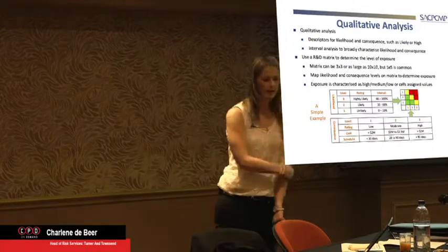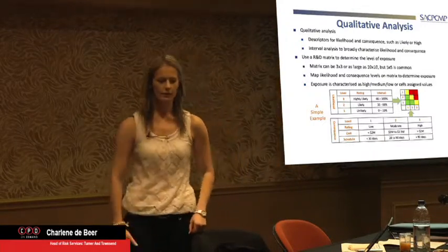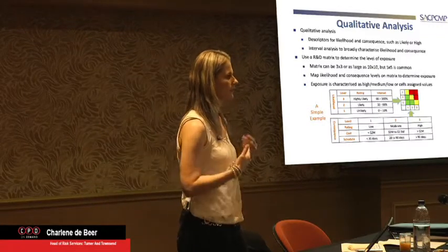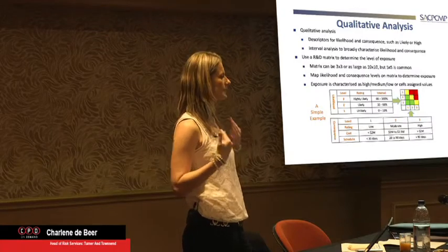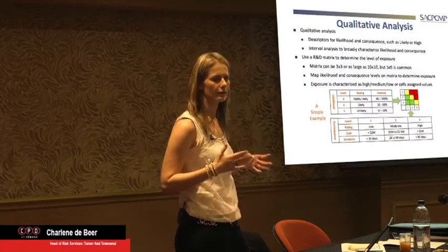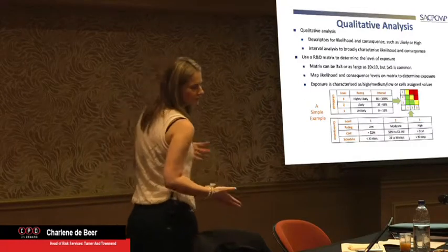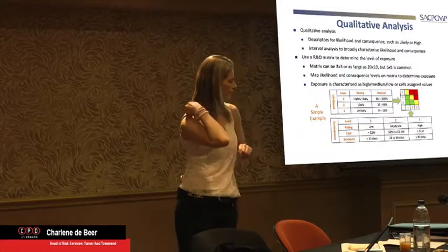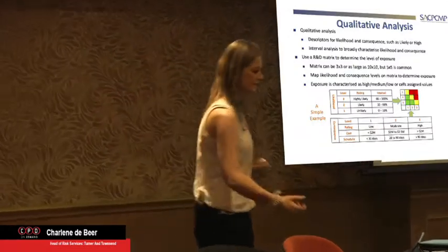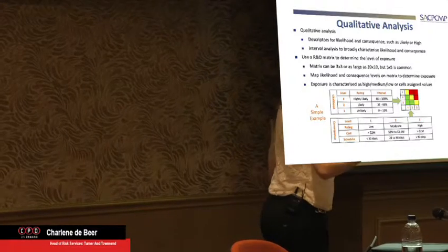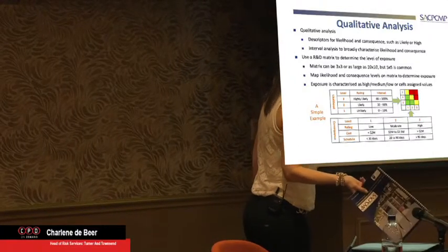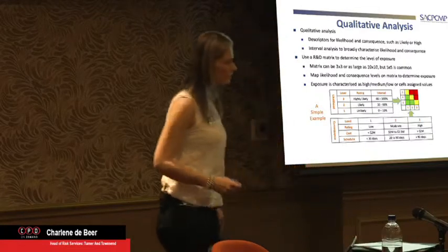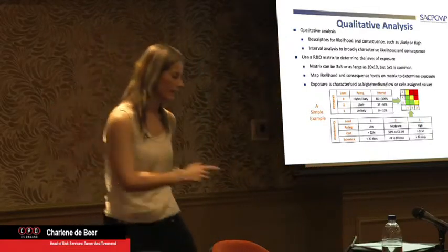They specialize in that. But we must also remember that these guys don't always take risks and certain conditions into account. And that's where we come in. We, the project risk team, we're the contingency guys. We're the guys saying, guys, this is your get-out-of-jail-free card, which it actually is. People think a risk register is a swear word. We're saying that if you have a risk register, you've costed it and you've scheduled it. So you don't have a P0 cost or a P0 schedule. You've got a P30 date. Let's say, for example, you build in 30% float and 30% contingency. But now I can back up my 30%.